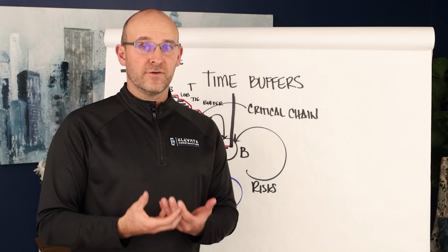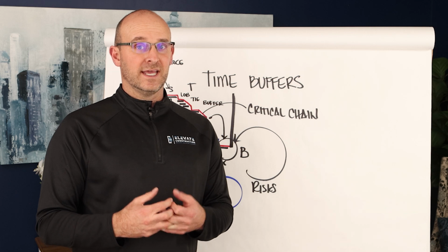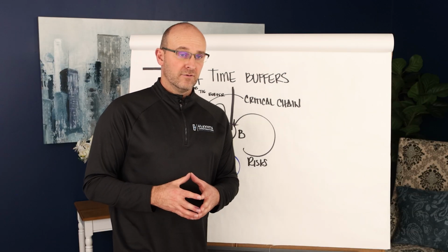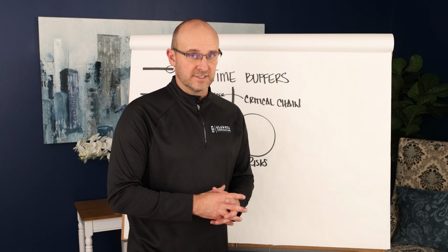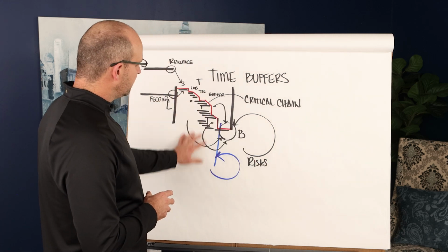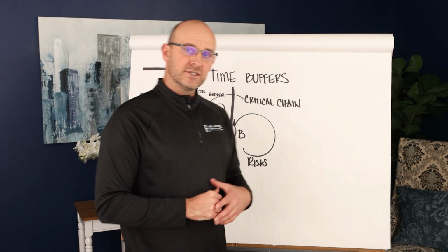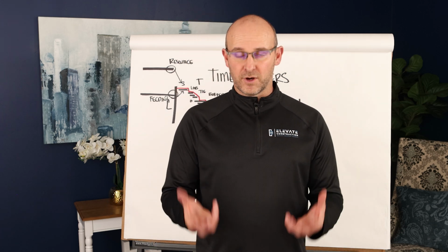So a buffer in construction is kind of like an allowance in cost accounting from a construction standpoint. It's specifically allocated to buffer a specific risk. So we do need to make sure that we have a risk analysis here. But let me just say this, buffers are a thing. They're a part of having flow.